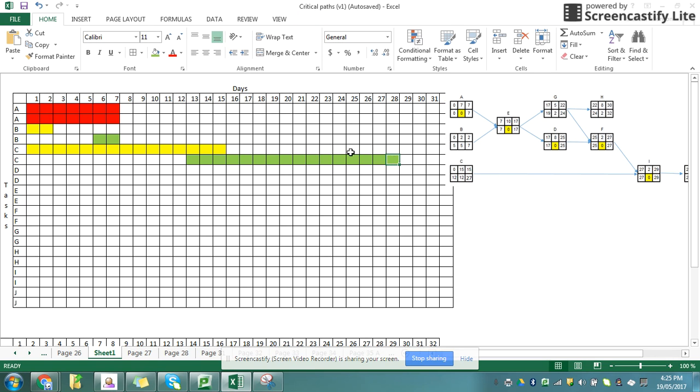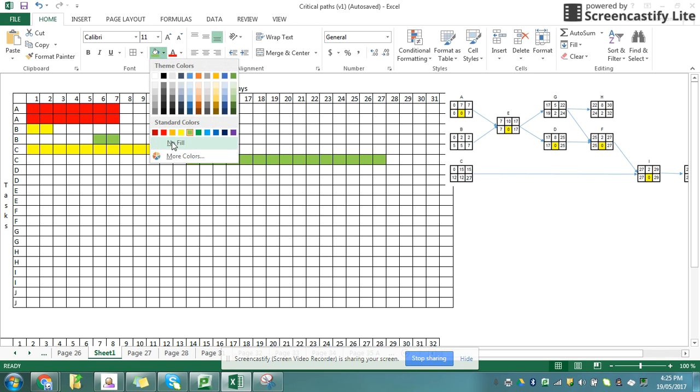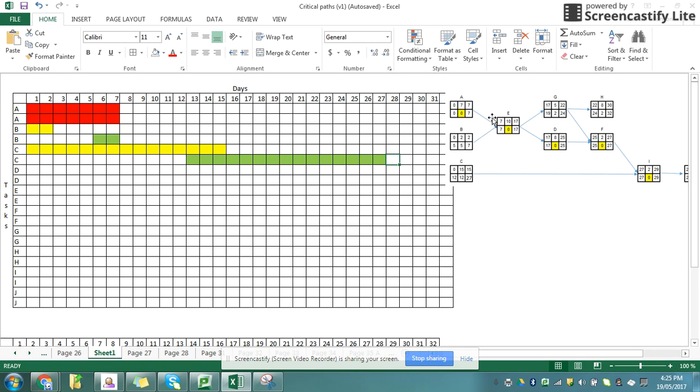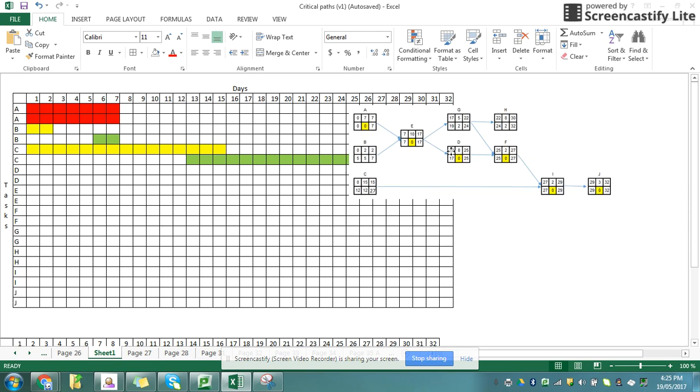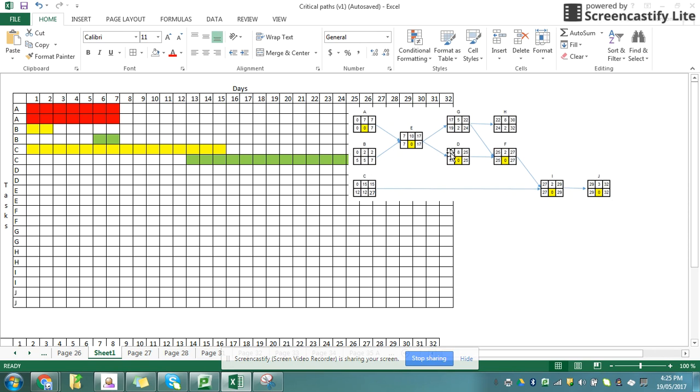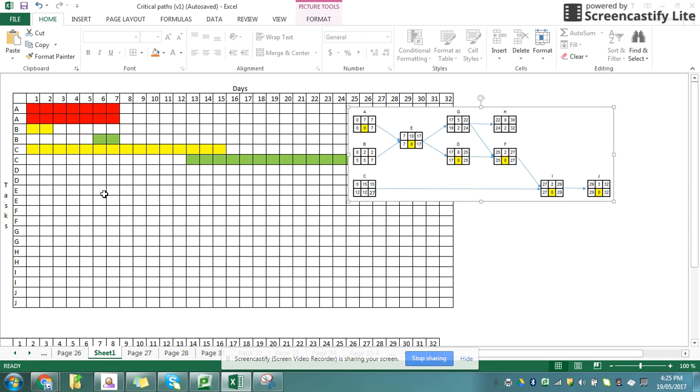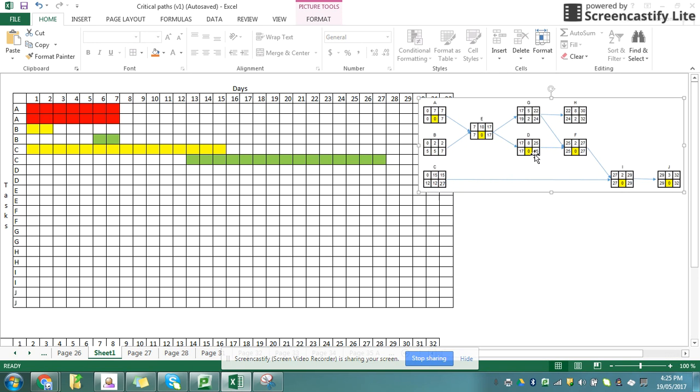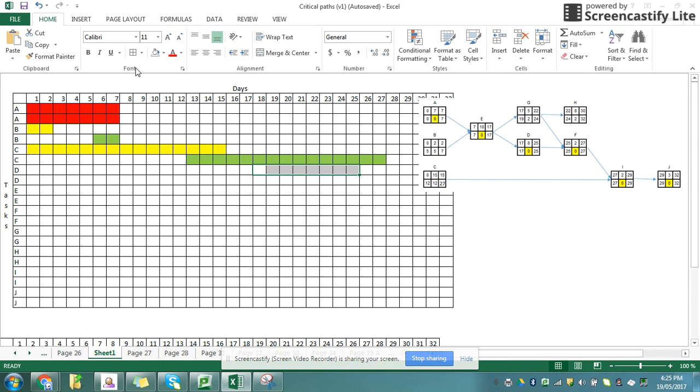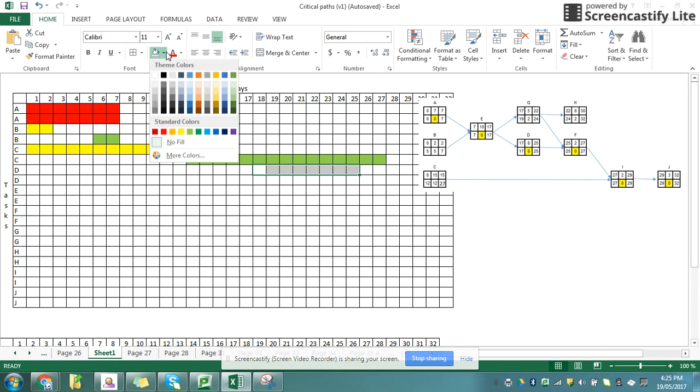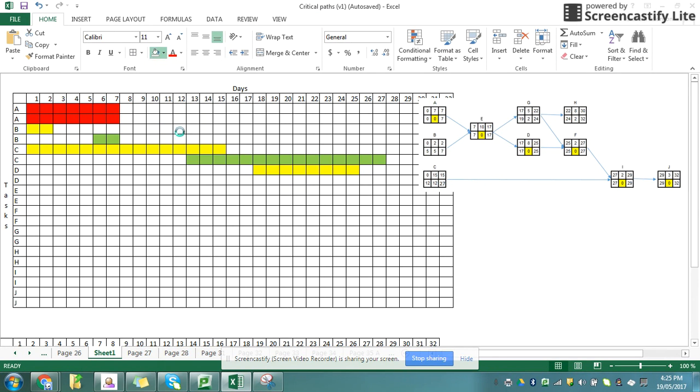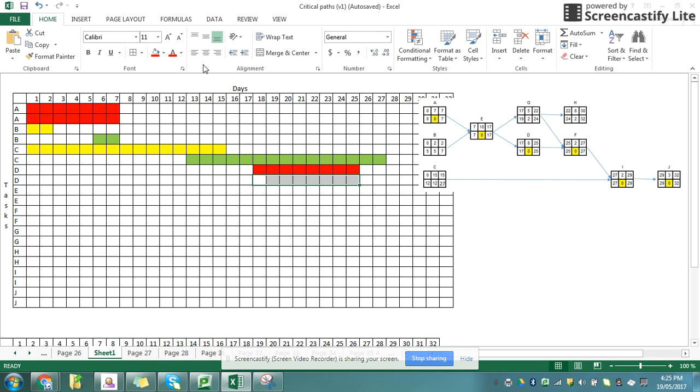Went one square too many because it was hidden behind the picture. Okay, so task D starts at 17 and finishes at 25. So task D starts at 17 and finishes at 25. And task D also, that's a critical path, so I'm going to color it in red. And I know my second one is identical.